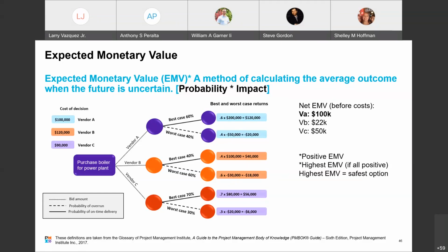So they may say, this is an example of where they'll throw you. I looked everywhere else, and I'll apologize to everybody next Wednesday if I find out that I'm wrong with this. I'm sitting here wondering, so why doesn't $100,000 make a difference? They're going to spend $100,000 here, $120,000 there, and then $90,000. Why don't these values matter? Well, they don't in this decision because, again, the impacts were provided, the probability was provided, and we simply used EMV to make the decision.